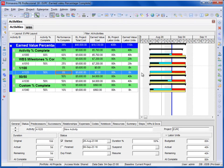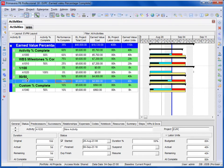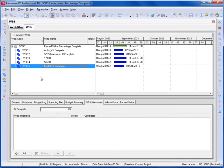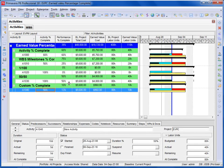With the 0/100 technique, the activity is not complete and therefore the Performance Percent Complete is 0 until the activity reaches 100%. If you mark the activity as 100% complete, then the Performance Percent Complete becomes 100%. With 50-50, you get 50% when the activity is started and 100% when it is complete. The Custom Percent Complete option allows you to manually enter a percent complete in the Earned Value — for example, entering 13% is then reflected against the activity.